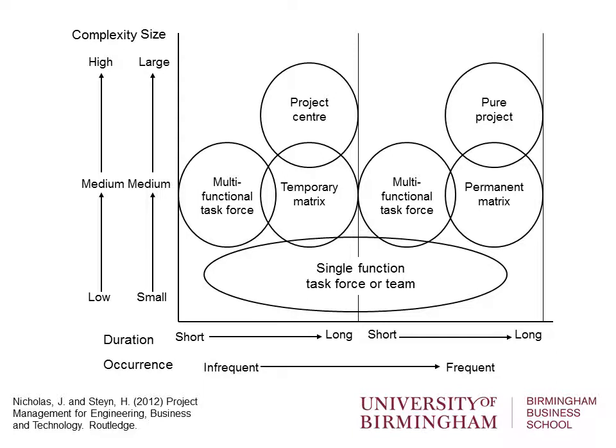And then finally, where projects are happening frequently and they're of relatively long duration, well, this is normally a pure project organisation. This is a project organisation and all they do is carry out projects, and that is where you find that pure project organisation. The big consultancies, the big construction companies, or any construction company really, architects, engineering companies, those sort of organisations, film companies will all be up there. Okay, so there we are. That's a neat model for thinking about what kind of structure we might apply to what kind of project environment.